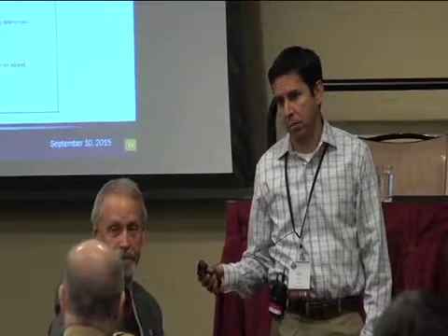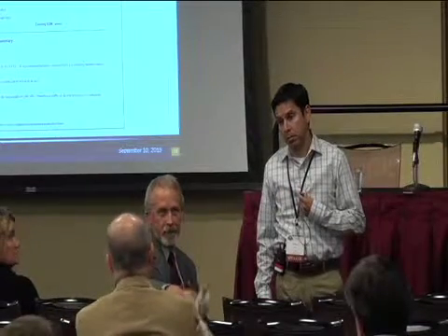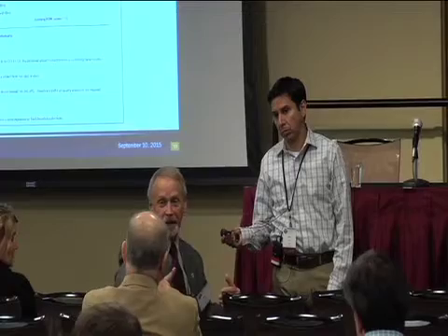Well, to me, if I'm preparing something for a client, a county, a city, something like that, I really need to know roughly a little bit more, like I said, whether it's going to be a CE, EA, or EIS, so I can give them an idea of the time frame that's going to take for the environmental. Well, that's a little bit backwards, because the environmental document level is based on impacts, not on location necessarily, or length, or things like that.